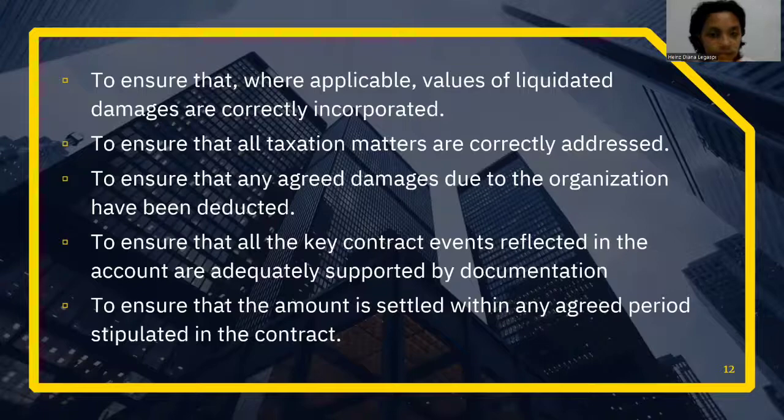Next is to ensure that all the key contract events reflected in the account are adequately supported by the documentation. So, ensuring that the paperwork for all the significant contract events reported in the account is sufficient. The last one, to ensure that the amount is settled within any agreed period stipulated in the contract. This is to guarantee that the money is paid within whatever time frame the contract specifies.